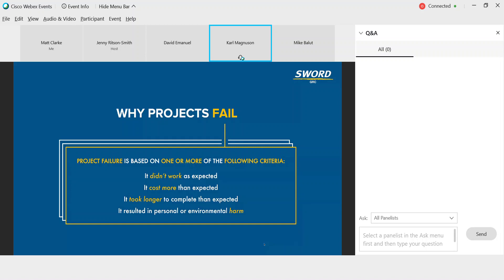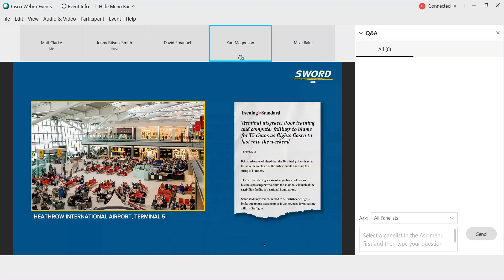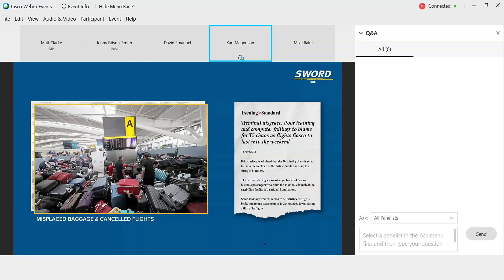Many of you may remember the story of London Heathrow's Terminal 5. The situation was described by the Evening Standard as a national humiliation. During the first five days, British Airways misplaced more than 23,000 passenger bags and cancelled 500 flights, resulting in losses of 16 million pounds. Looking at this picture, if you're like me, the thought that one of your bags is in this mess is stomach turning.